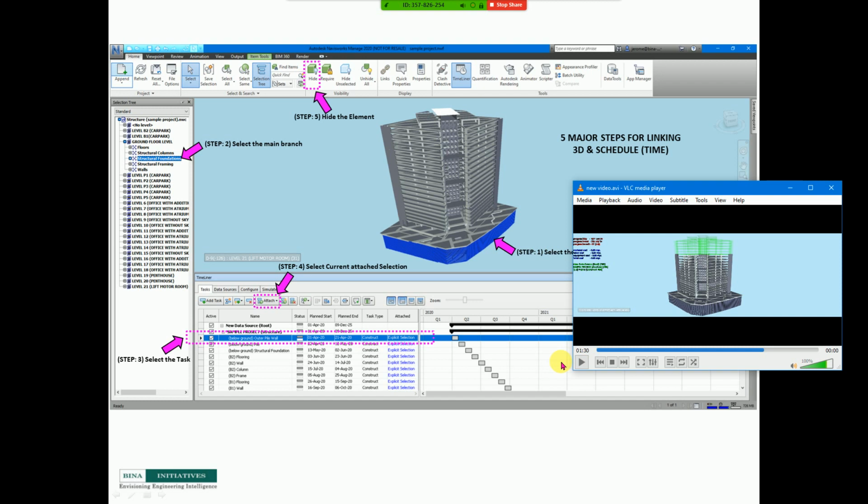For example, in each floor in the construction method, one square floor will be divided into four. The first quarter of the square is the first schedule, then the second schedule, then the third schedule, and then the rest.